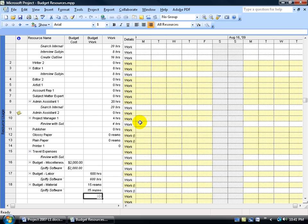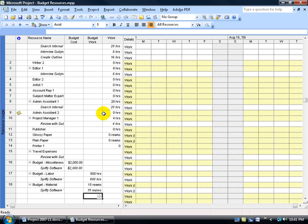Now we have our budget cost values entered. The whole point is to compare what you have budgeted against your actuals — 600 man hours budgeted. Rather than manually counting up all the hours by scrolling through each resource, I recommend grouping by resource type. When you group a view, it gives you the total of those groups. Go to the Project menu, select Group By, and choose Resource Type — or use the Group By drop-down on the toolbar.